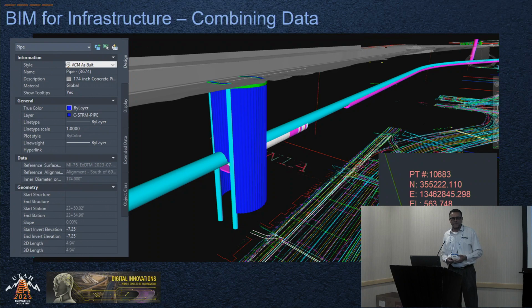This was all for record purposes. But we were constantly clashing against the utilities, and we were constantly monitoring from that data coming back in the as-built. This is a living model. But the data that came back from that as-built, I would have to run additional clash tests to find out what other systems were going to be impacted by this thing not following the design path. So it was really important. The underlay, the information you see down there at the bottom, CAD and GIS. All data.